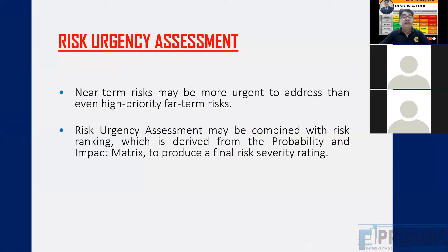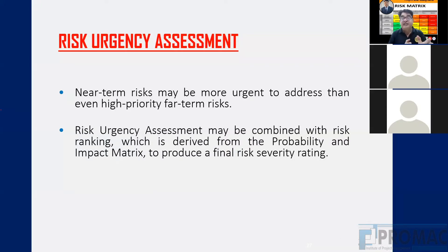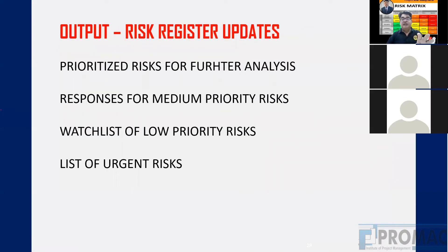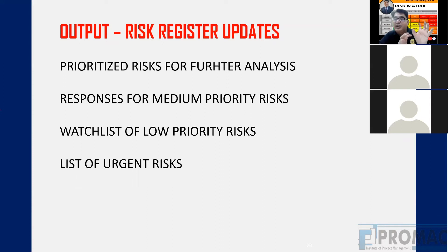After qualitative analysis, we move to quantitative risk analysis, where we get exact numbers — for example, because of this risk my project will be delayed by seven days, or there is a 50% probability that this risk will delay the project by 20 days. From qualitative analysis we get: prioritized risks to take for numerical analysis, responses for medium-priority risks, a watch list for low-priority risks, and a list of urgent risks. Numerical analysis tells us exactly how much extra cost to keep in the cost baseline and how much to adjust the schedule baseline.